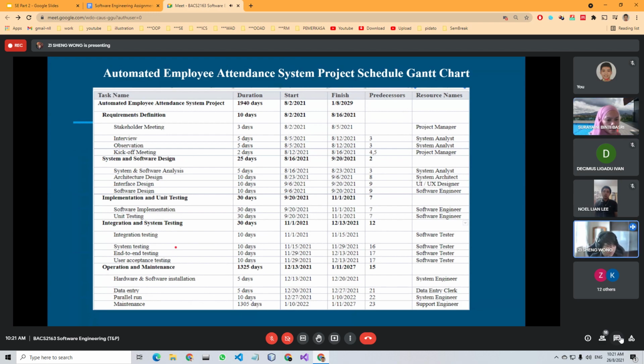One of the best examples of parallel run is the online attendance of our Thai UC app. When the online attendance first rolled out in our Sabah branch, while we were using the online attendance to take our attendance, we also used the manual attendance to sign our attendance. Both methods ran together until the online attendance was stable, and then we completely switched over to online attendance.